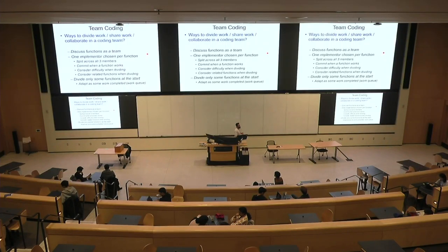Consider the difficulty of the functions when splitting the work. Some functions are more difficult than others, and they will probably need more time. So it's not necessarily about giving, for example, 4 functions to each member.